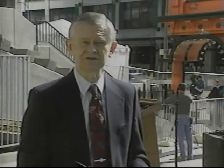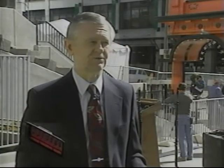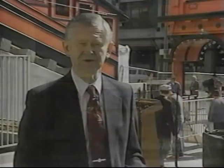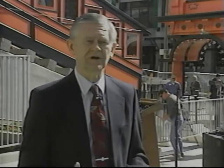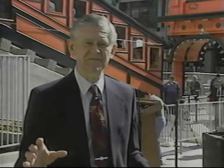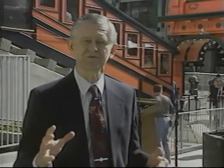The station house and the arch had been sitting outdoors in storage for 25 years and were very decrepit. We had absolutely no knowledge of how they had originally been constructed other than what you could view from the outside. So a major part of our early work was doing a historic structures report, which involved actually going up and x-raying and examining how the buildings were constructed.